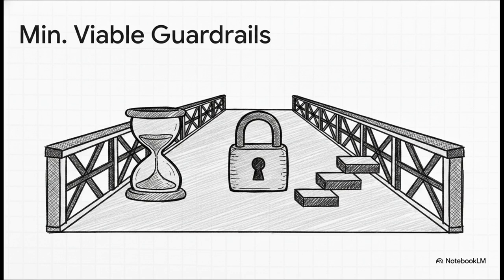This includes severe stress testing under simulated peak loads. Limit customizations. Organizations must adapt their internal processes to standard system functionalities. Customization should be reserved only for areas that provide genuine, measurable competitive differentiation in the market. Phased deployment. The system must be introduced incrementally. Roll it out by specific module or geographic region. This allows for iterative stabilization and localized issue resolution before you attempt an enterprise-wide scale.